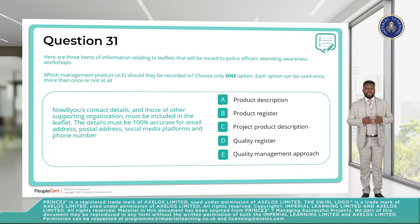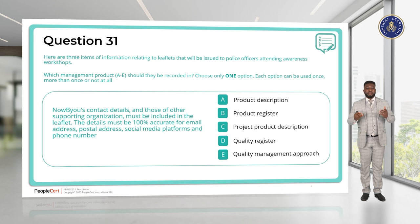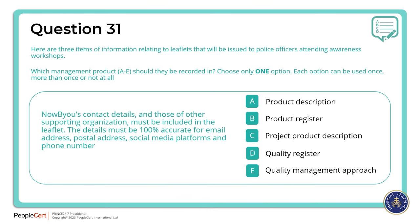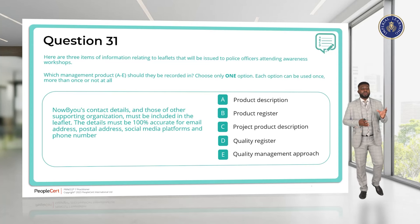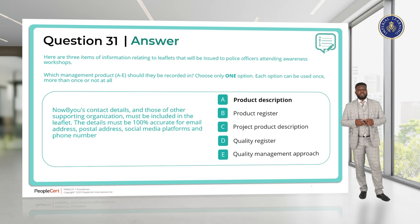Question 31. Now Be You contact details and those of other supporting organisations must be included in the leaflet. The details must be 100% accurate for email address, postal address, social media platforms and phone number. This sounds like something the product must comply with in order to be acceptable — quality criteria that must be met. This information will be found in the product description, which consists of quality specification and tolerances. The answer is A, product description.